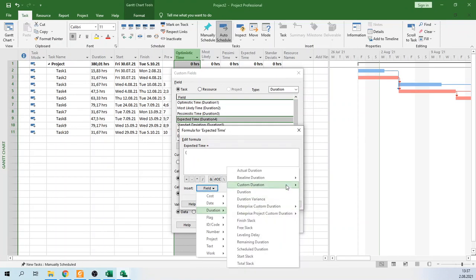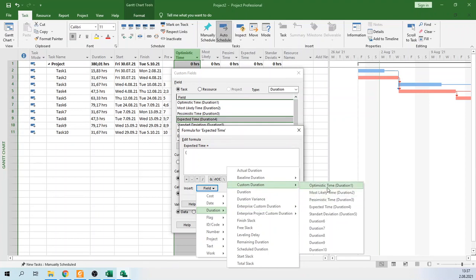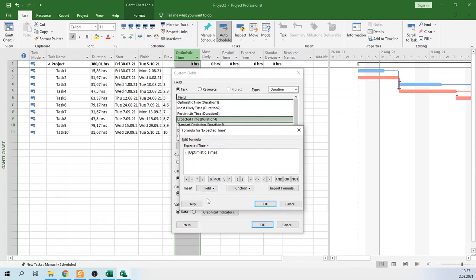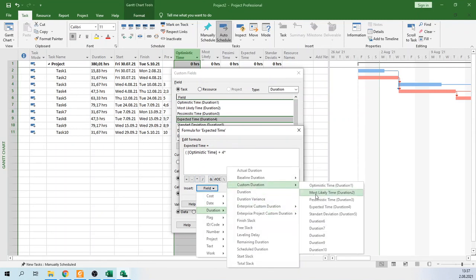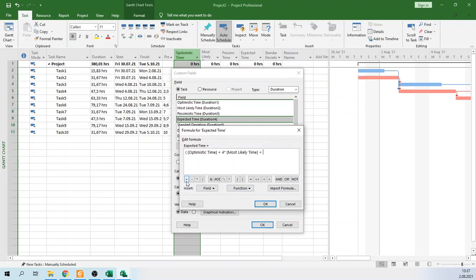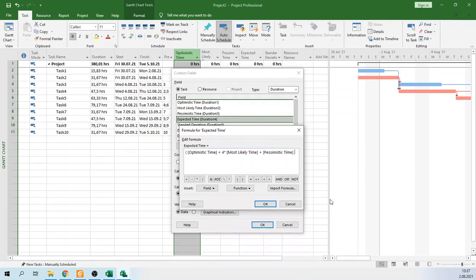Click on Field, then Custom Duration, and select Optimistic Time. Then from the keyboard add plus 4 times Most Likely Time, plus Pessimistic Time, close the bracket, and divide by 6. You can define this formula as shown here, then click OK.